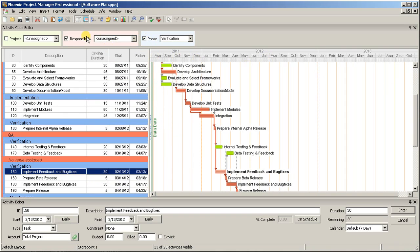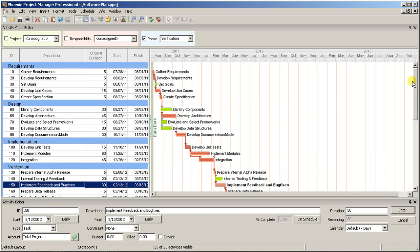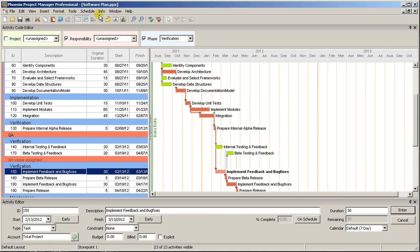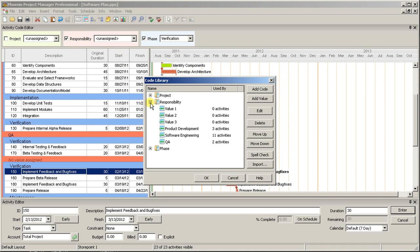If you want to change the order in which values appear underneath the code, you will have to revisit the code library. From there, you can select a value, and then click Move Up or Move Down to change the order it appears in relation to other values.